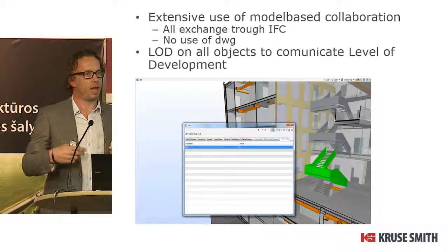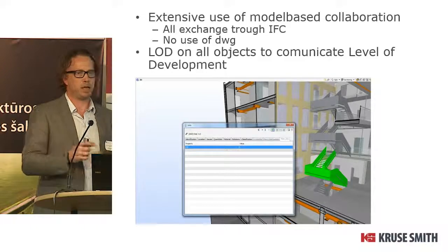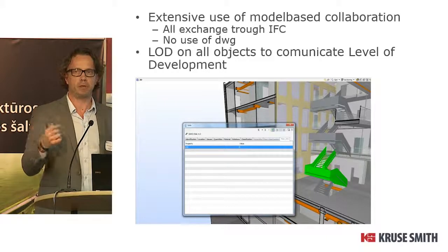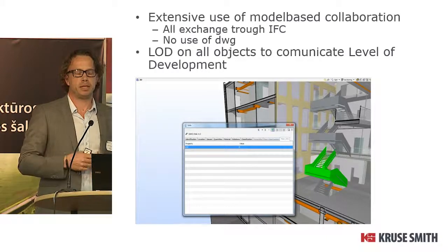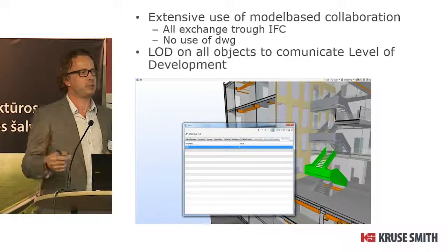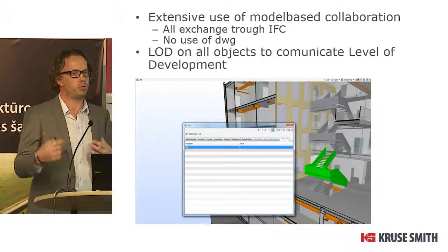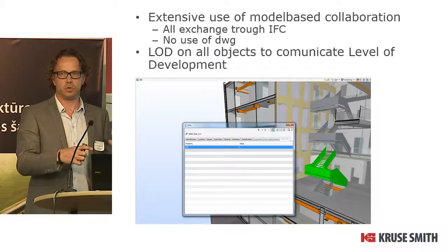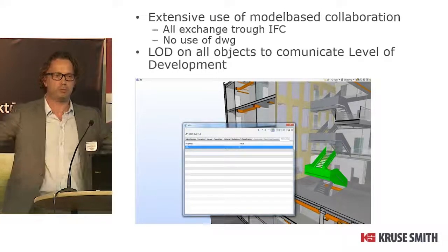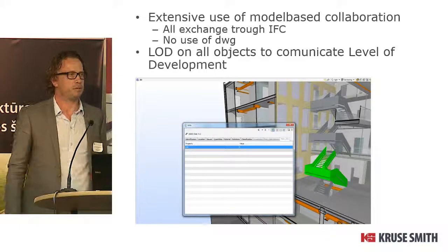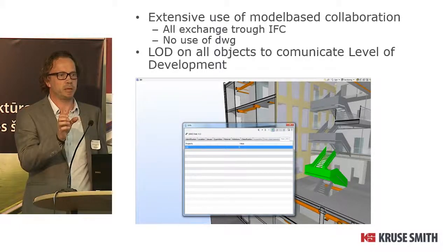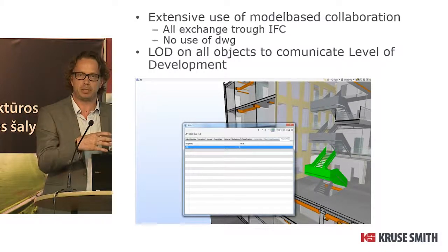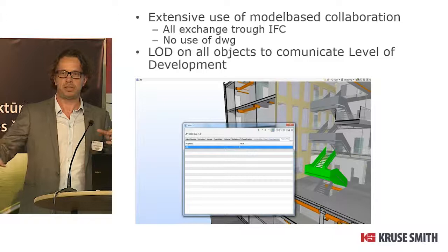Or if it's level A, I know that this is finalized. I can't move this. This will cost a lot of money and a lot of cooperation. And the architect joined in and said, yes, it would be very interesting or useful for me to know the status of your column. Not just the 2D drawing of the entire level, but one single object. Maybe just one column has the status of A, which is finalized, and the rest is still in C.